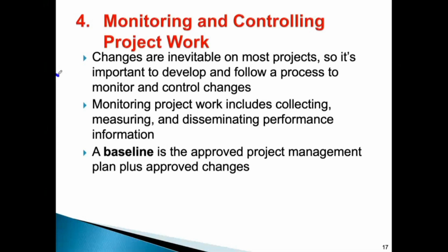So any change in the baseline, any change in the plan after approval, needs to go through a change process. You don't change after approval. You do whatever was agreed and signed. But if you need to change, then we have a process. We call it the change request process, and we will come to it in a minute.